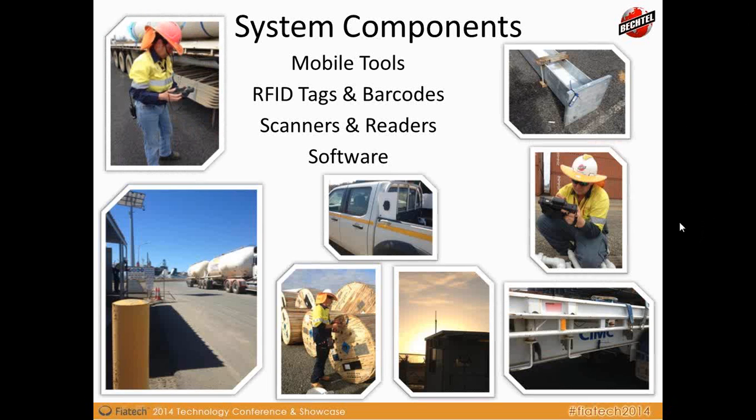So far to date, we have 37 mobile demand tablets that are located and dispersed to all project locations on the mainland that you saw there, Curtis Island, of course, and at the spool fabrication location in Turkey. We have about 60,000 active RFID tags, which of course are reprogrammable tags if you're familiar with RFID, applied to various material types. These include obviously steel bundles and pipe spools and the things that you would typically see tagged that would go into an LNG facility such as the ones that we're building there.